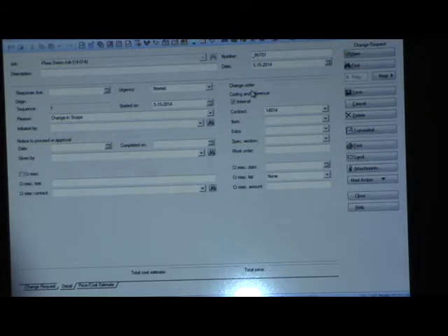So we want everything in one log so that you guys can print your change request log and see everything. But we also want to be able to say, print the version that I can hand to the owner, so don't include the internal stuff. Right. And it's less useful for the type of work you're doing, but there are cases where you've sent the owner 20 proposals and he's only answered 3 of them. And the owner says, what are all the proposals you're waiting for again? Then you can print out that list of here's what I've sent you, here's what you've gotten back to me on, here's what you haven't.